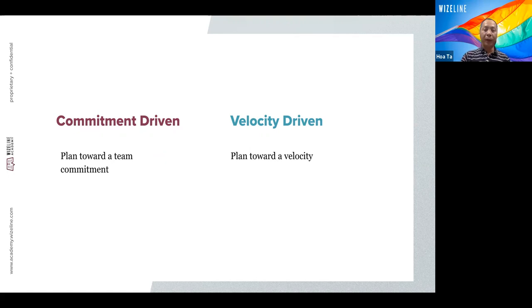So let's say we start adding stories into the sprint until everyone in the team feels that we can commit to that. If they feel it is too much, we can't do that much, then we need to pick something out. And if they feel, no, we still have bandwidth to do more, I feel confident about adding something more, that means we add something more.